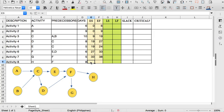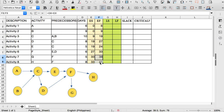Activity H is also dependent on F, which is 33, and the early finish of H is 41. That is the forward pass of the critical path method. Now we solve for the backward pass of the critical path method.